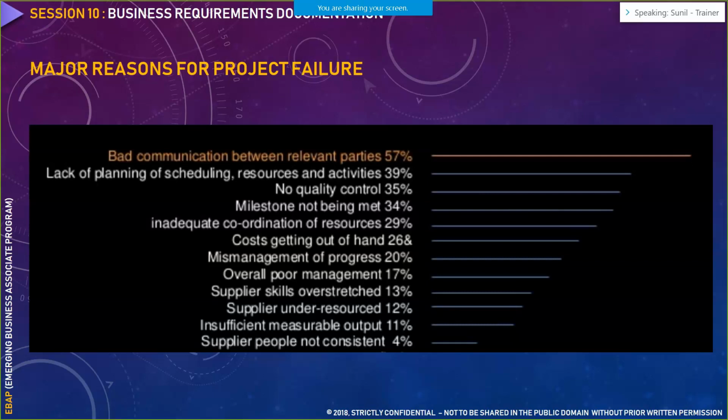That is when business requirement documentation came into the picture, wherein we gathered all the relevant information which all the stakeholders would be needing: their needs, their business objectives, the purpose of the project, the high level view of the project, what their current system is doing, what their expectation is out of the proposed system, how they would like to see the system. Apart from that, the functional requirements, the non-functional requirements, any risks, any assumptions, all of these were captured with the help of the business requirement document.